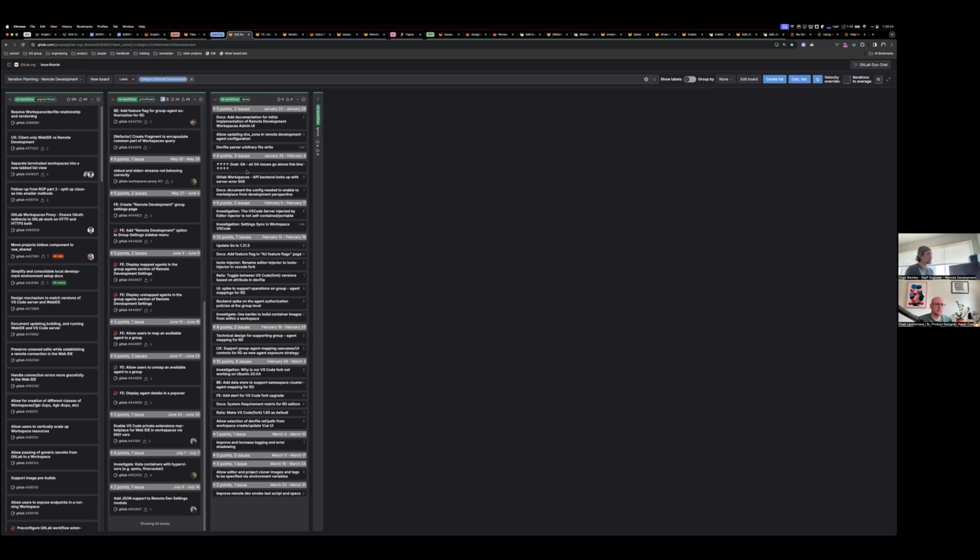And from the team's perspective, they love it because it's impossible. You cannot put 10 pounds of flour into a 5-pound bag. You can't put 20 points of work into a 10-point iteration. It's just not going to happen. The markers will flow down. So it removes the ability of stakeholders to try to coerce you to do more. It's like, no, this is what we do. And if you think we don't go fast enough in general, okay, that's a separate question. But this is how fast we have historically gone. Right. And that may be a matter of, right?